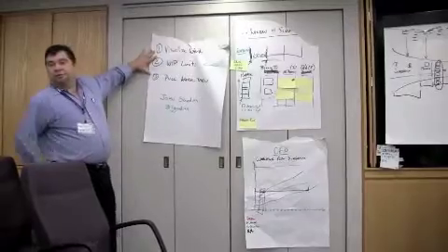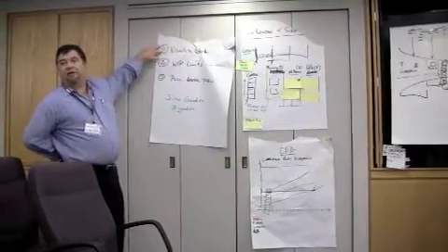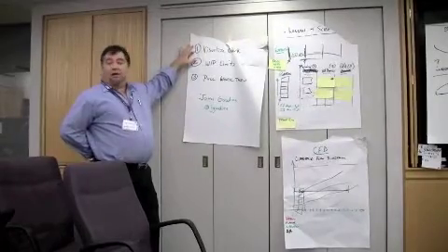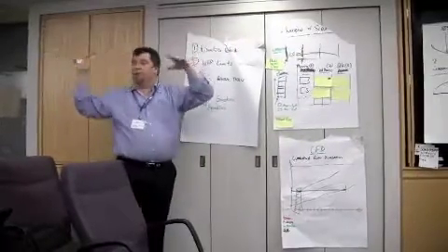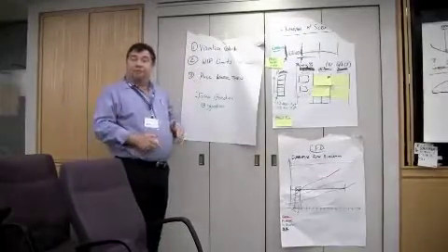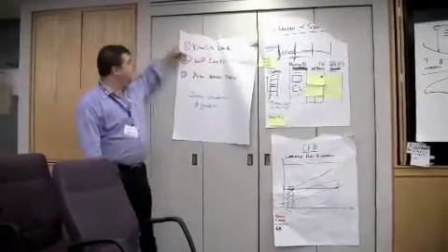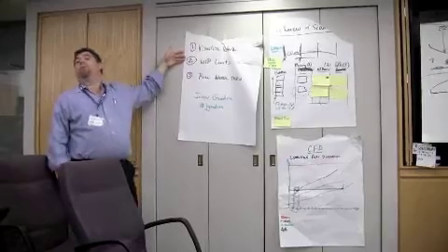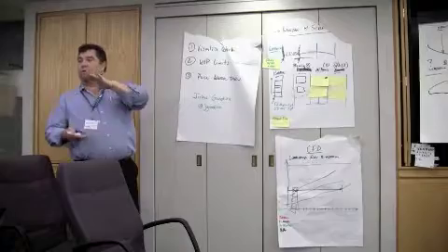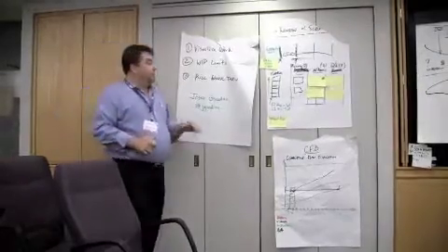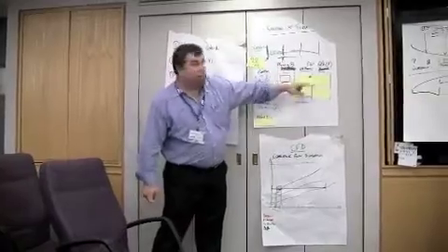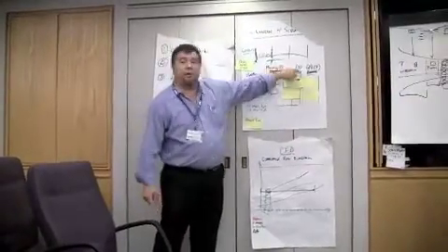The three rules are you've got to visualize your work. If you're doing Scrum or something like that today, you've got a card wall. That's visualizing your work. The swim lanes are your workflow. That's great. A lot of us visualize the work. The real secret is the second step, putting work and process limits in place. We're going to clamp down how much work we can be doing at any time, or throttle it down. So in our typical cardboard, we put work and process limits.